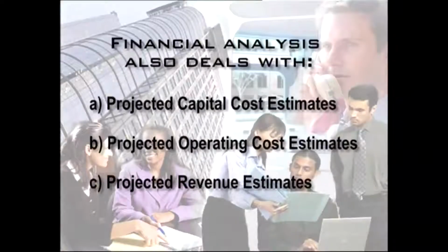One is the capital cost estimates, which are to be incurred even before the plant starts producing anything commercially. It has not yet become operational. And a second head of cost where all the cost estimates which you make are going to be incurred in order to run the plant, operate the plant. So these are two broad heads under which we have to be able to forecast the costs over a span of time, and they play a very important role in taking a financial appraisal of the project.